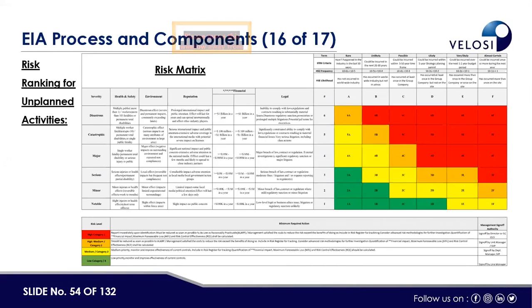What are the measuring tools through which we can identify that EIA is not required in any project? Basically, there is no tool which we can use. As we mentioned at the start of our presentation in the briefing, it basically depends. We have to carry out a screening study on the basis of a group discussion, the project documents, and experience, to decide whether EIA is required or not. And in some countries there is a rule to submit an environmental permit application to the regulatory authority, and the regulatory authority will determine on the basis of the provided information whether EIA is required or not.